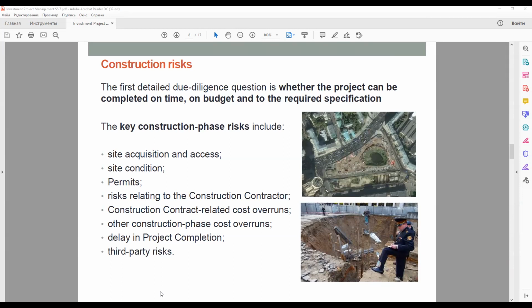The problem can be especially acute in linear projects, that is, projects that do not occur on one site but are built over a long stretch of land where a detailed site investigation may be impossible, such as a road, pipeline, or electricity grid line.